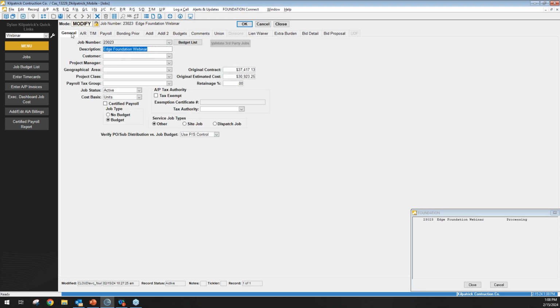It'll pull your cost codes, your cost classes, and from there, that's going to give you guys a lot more capabilities in other parts of the system. It's going to limit time card entry. It's going to limit AP entry so that you make sure you're only putting things in against items that were budgeted for. It'll link out into our project management software, Project HQ. It'll link out into our timekeeping software, WorkMax, as well.